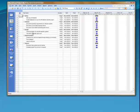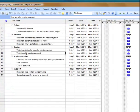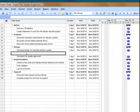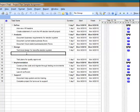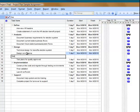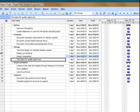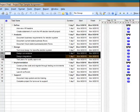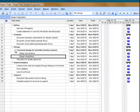Now we're just going to continue that with level 3. Let's say I'm going to put a couple tasks under row 9. So I'm going to use my keyboard and do insert a couple times, and enter the conversions and design integrations. As with before, I'm going to select the tasks and indent them with a green arrow, and now we have another level of grouping.